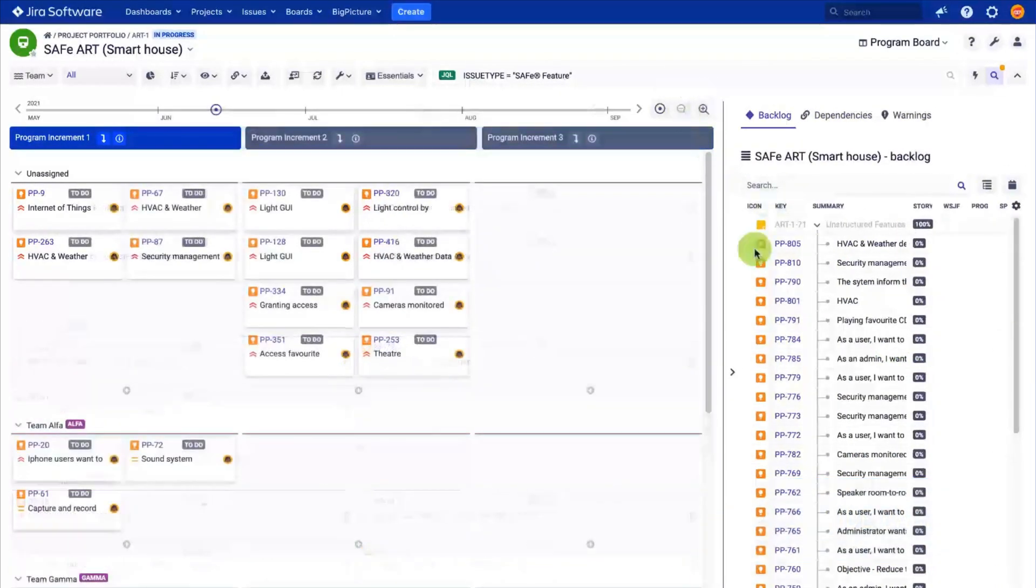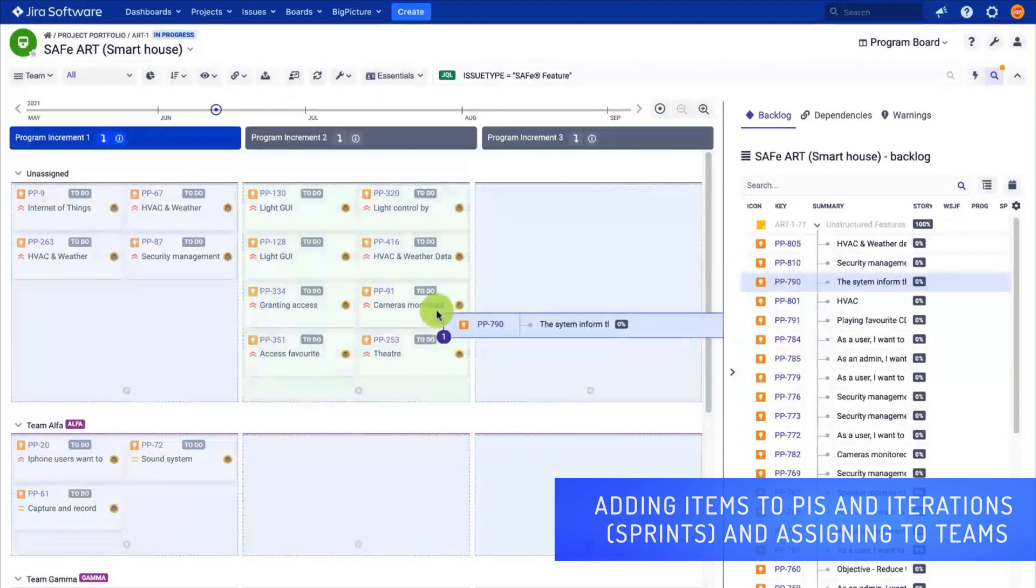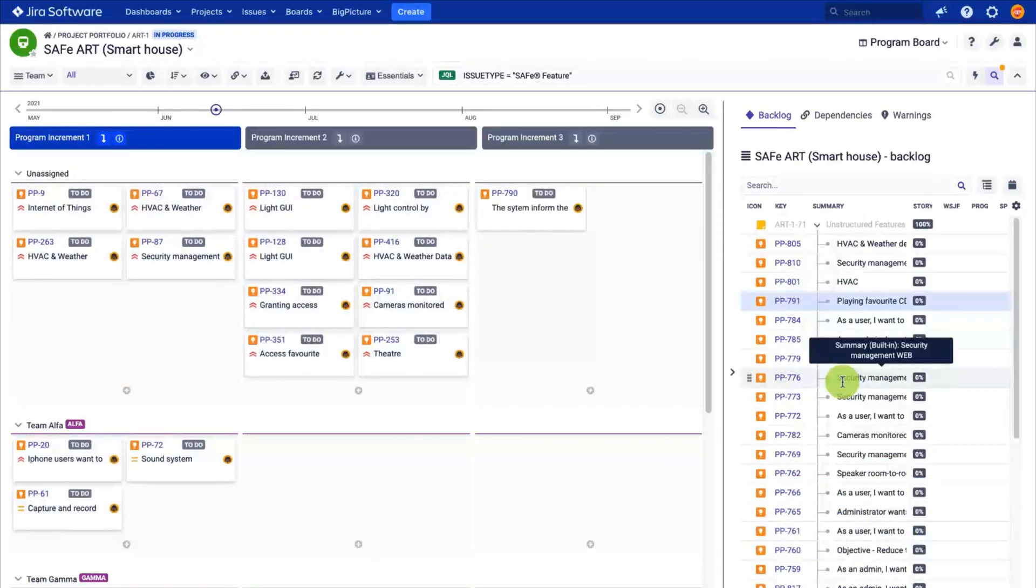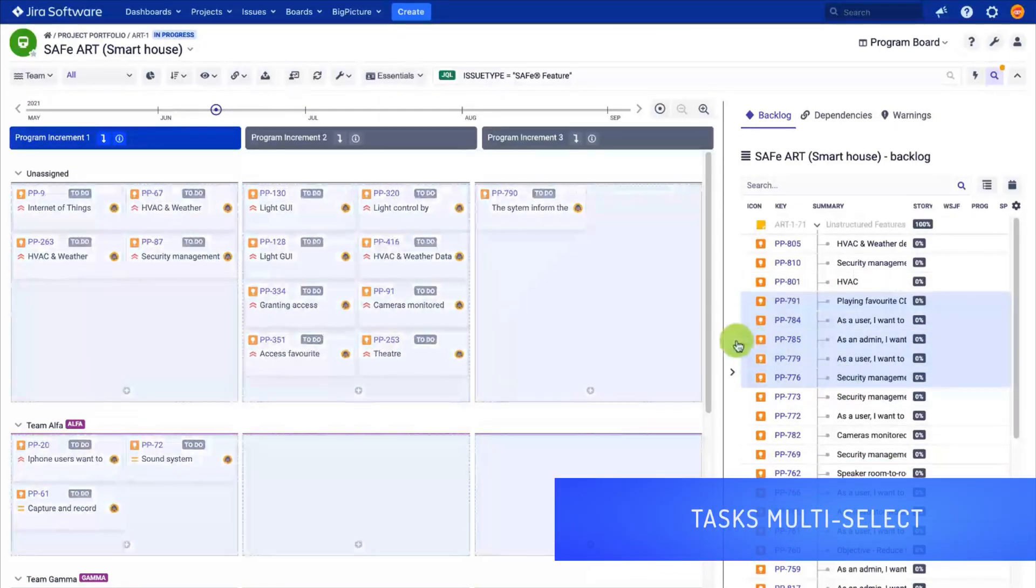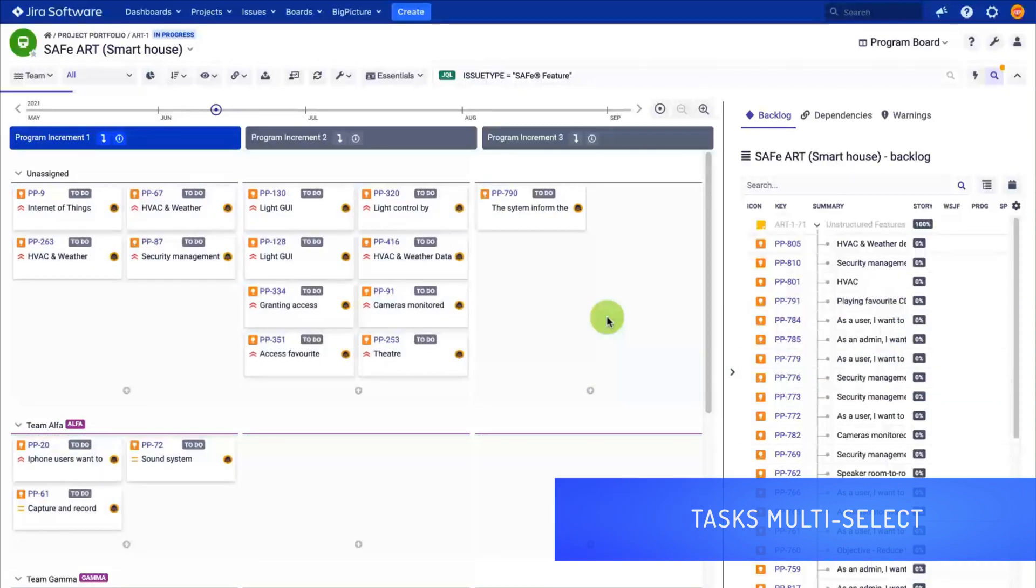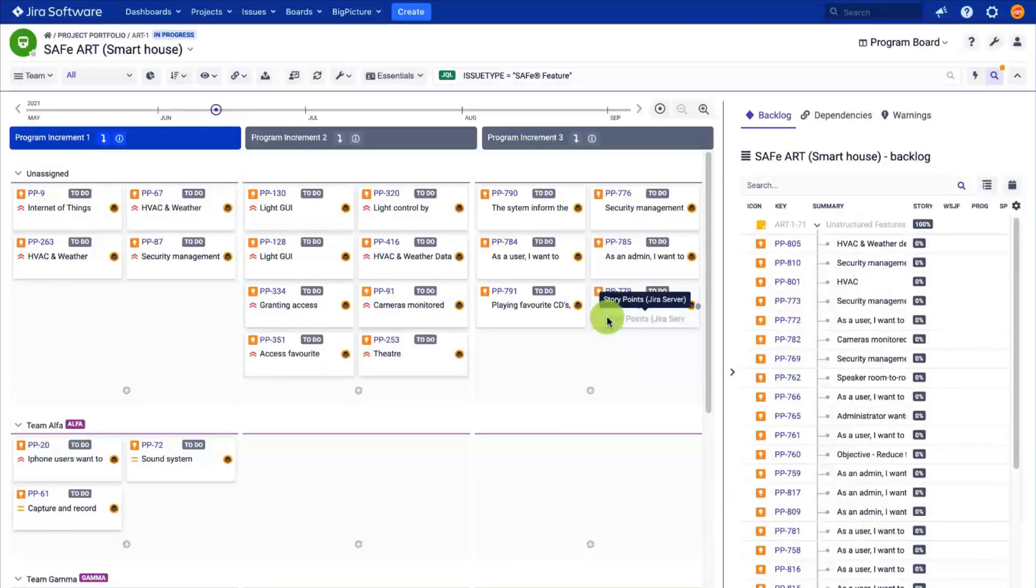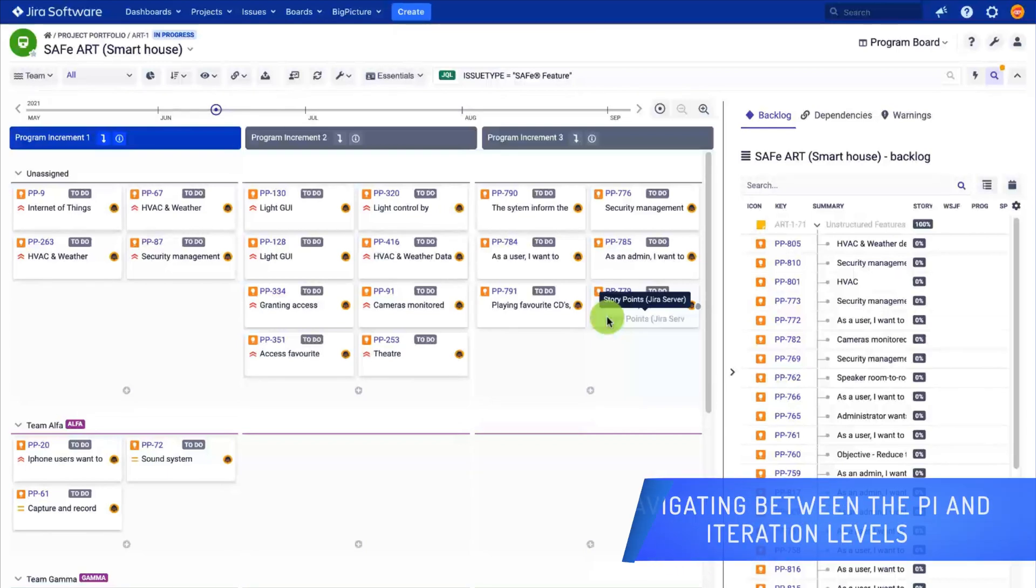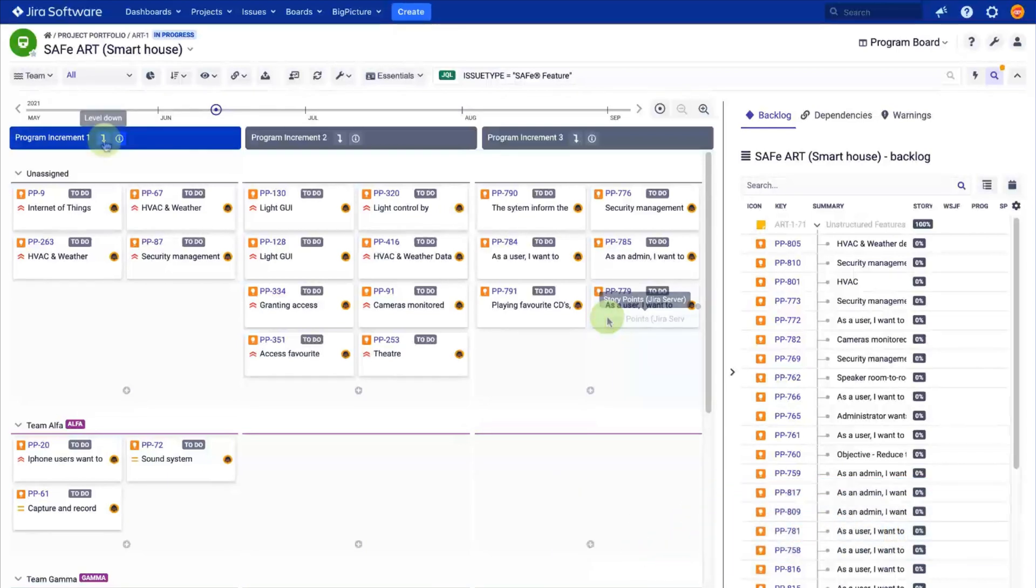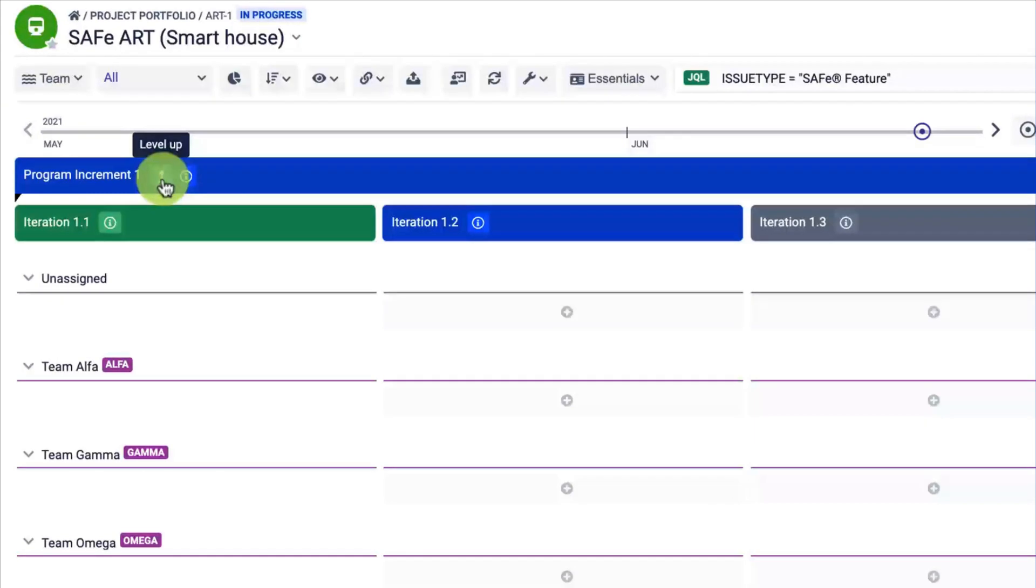And assign them to the team and different timeboxes. You can use multi-select to move multiple items. Place your features in the unassigned swim lane as the teams will select features they will deliver and decompose them into stories. Again, there are different ways to do that using drag and drop or by editing the team assignment field. To switch to the iteration, click the arrow on the selected PI.